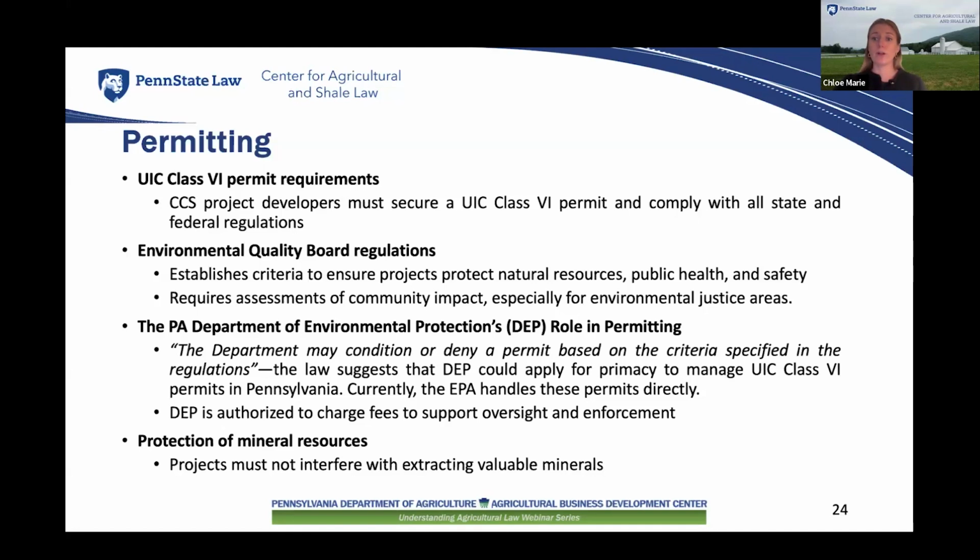So the project developer is required to check if there are any commercially valuable minerals in the area, identify the subsurface property owners, and notify them in writing. If a mineral owner thinks the project could affect their ability to extract those resources, they can object to the DEP.